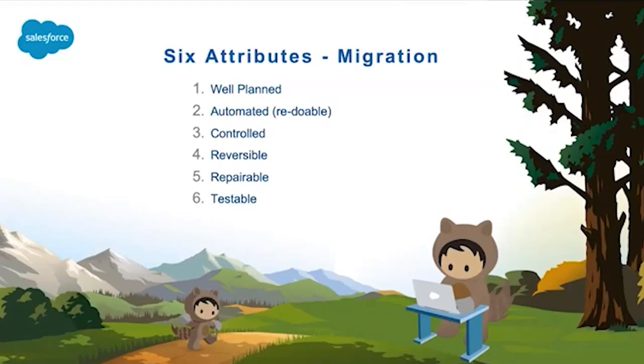So the most common use case for the controllable attribute is when the customer simply tells you they want to migrate the account. That doesn't mean only the account. There may be account roles and other dependent objects involved. The customer may not explicitly specify because they trust the technical team and will simply say they want the account migration. As part of well plan, you need to ask what all the things are to be included in addition to the account, what the dependent objects are, account role, and other details.